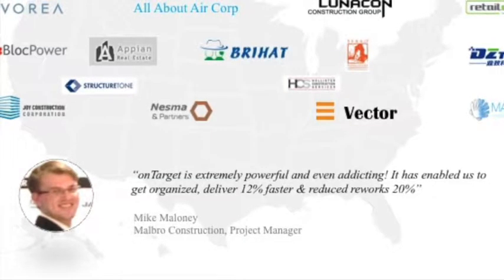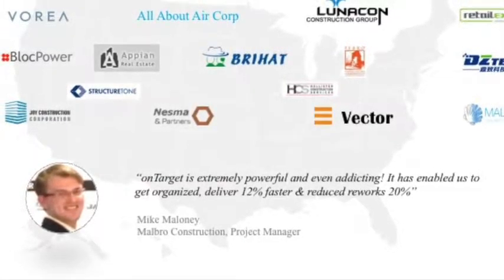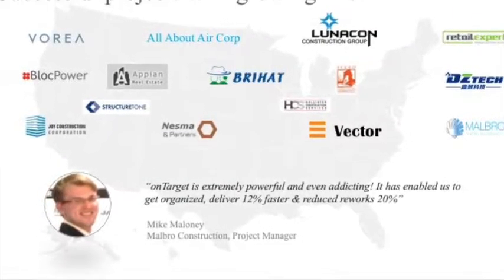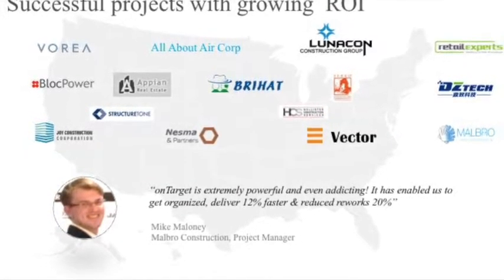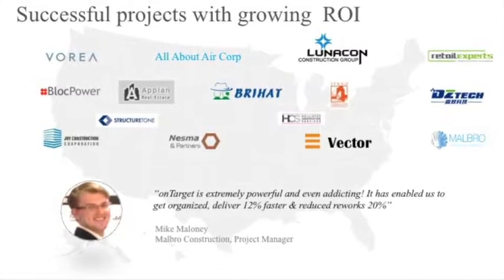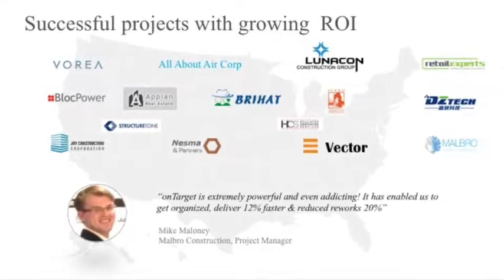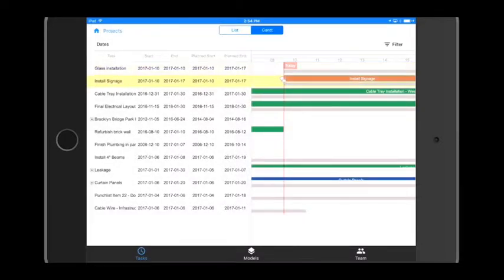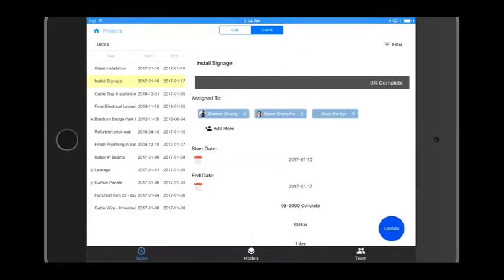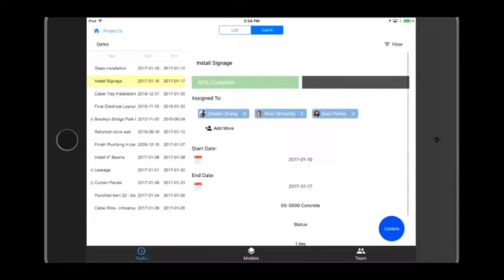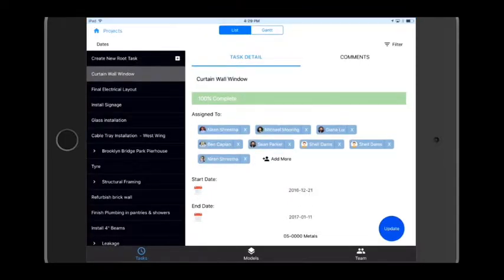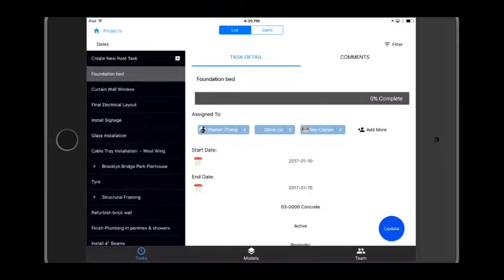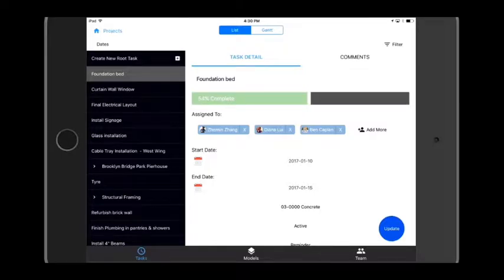Based upon the feedback that we got from the customers, we've added several layers of permissions and filters into our application for doing a two-week look ahead on the iPad application. The field worker is only able to see what he's supposed to do and he can just change the percentage complete, because if it's more than four clicks, they will give up on that.